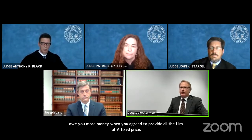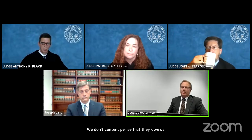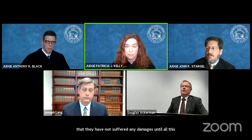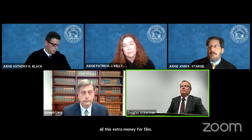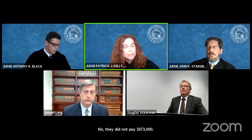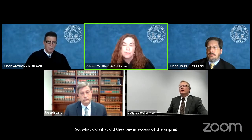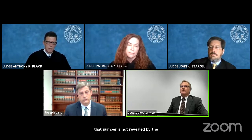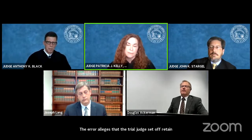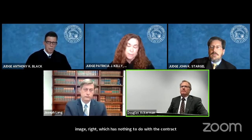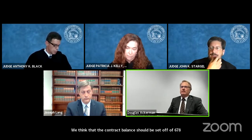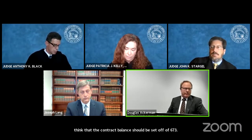We don't contend per se that they owe us more money. We contend that they have not suffered any damages until they paid for all this extra money for fill — they did not pay $673,000. The error alleged is that the trial judge set off retainage, which has nothing to do with the contract balance. We think the contract balance of $673,000 should be set off, and there is a clear error in change order 17.